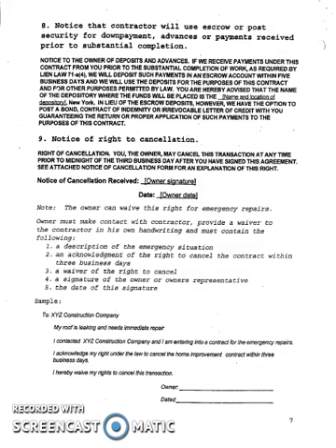Number 8 is the notice of the escrow. So the contractor is required to put all additional funds into an escrow account. They cannot pocket the money that's provided to them from the owner or put it into their own bank account, things like that. The money must be directly used for materials or to pay employees. Any excess monies must be put into an escrow account until the project is complete, or substantial completion, meaning that it's more or less complete other than the final walkthrough and approval and sign off with the owner.